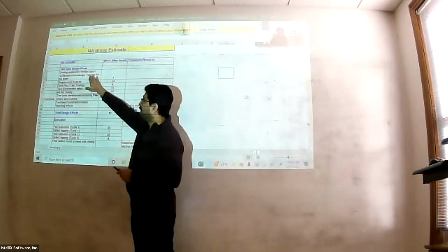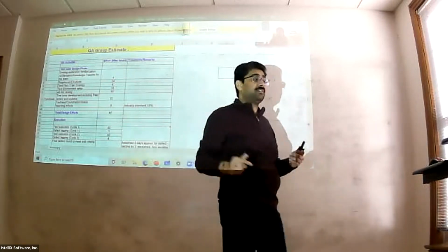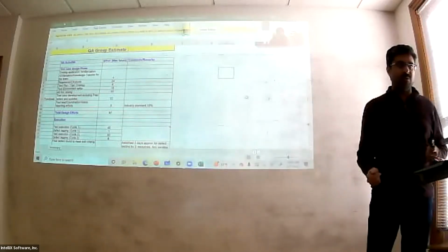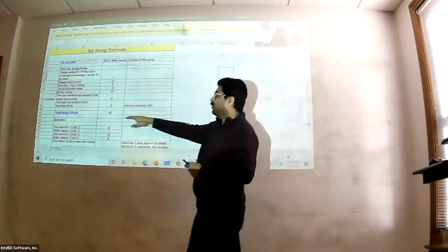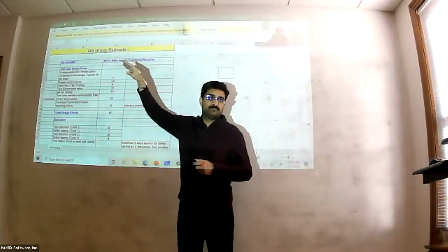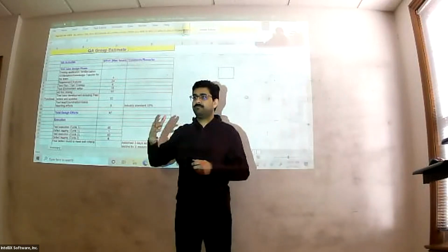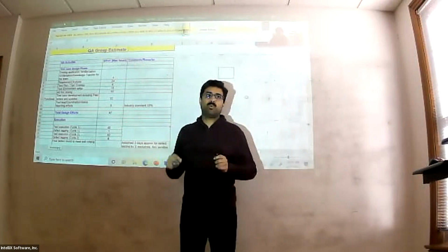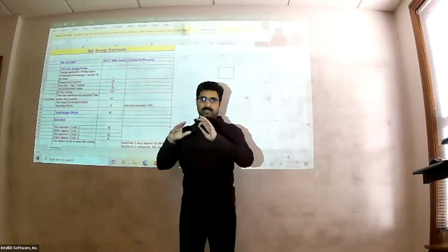So for example, I need to understand what the current environment is. I'm going to allocate 4 hours. I'm going to meet with a couple of people and understand what it is. Then I'm going to do a requirement analysis. It's going to take me 3 days, right? Because I need to read it multiple times to understand it. If I have questions, I need to go ask people, get an answer, get that clarity.